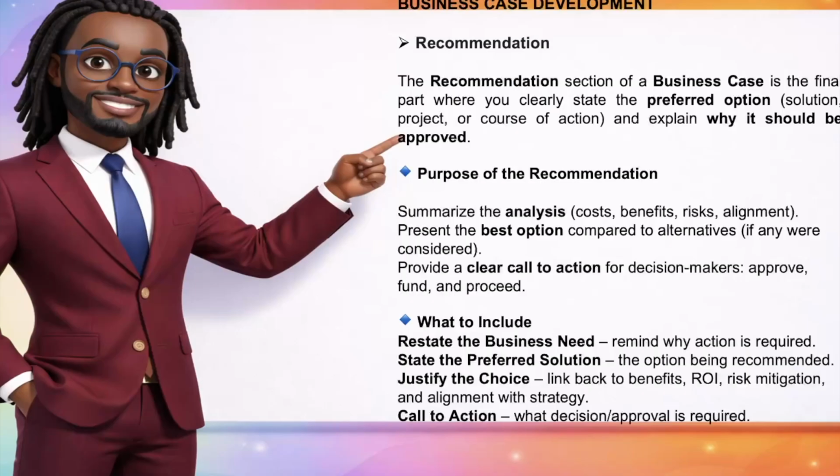Now, we have reached the final stage of the business case development. Our recommendation clearly states the preferred option and explains why it should be approved. It summarizes the analysis, presents the best options, and provides a clear call to action. Purpose and contents are: the recommendation should restate the business needs, state the preferred solution, justify the choice with benefits and return on investment, and call for approval or funding.